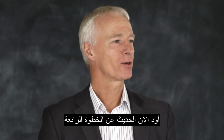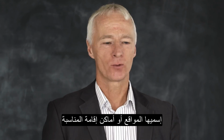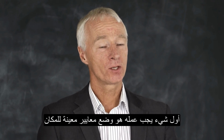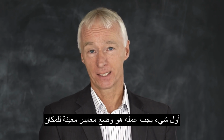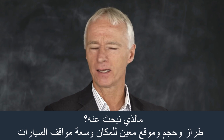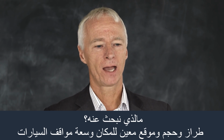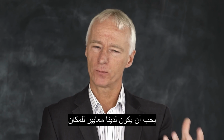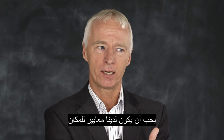What I'd like to do is to talk about stage 4. I call it places or event spaces. So this is the venues that we're going to use. So the first and foremost thing that we've got to do is kind of set a venue criteria, as I call it. So what are we looking for? Kind of types, sizes, numbers, location, parking, how long we're going to be there, all those sorts of things. So we get this kind of venue criteria.